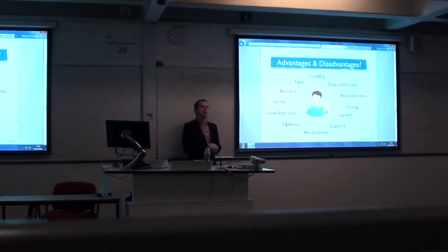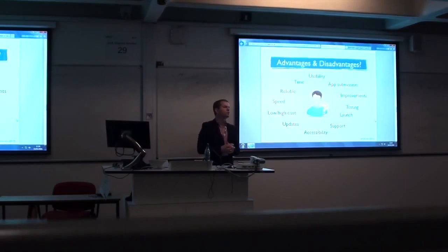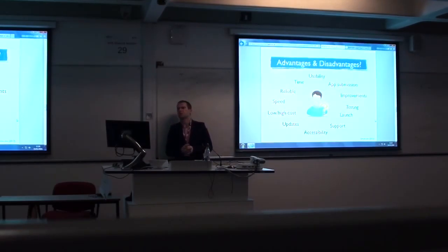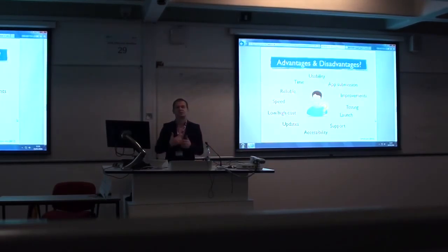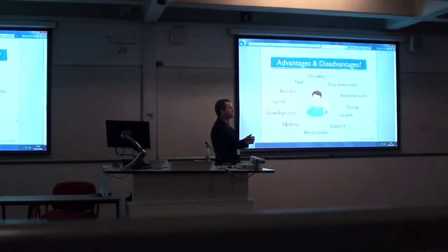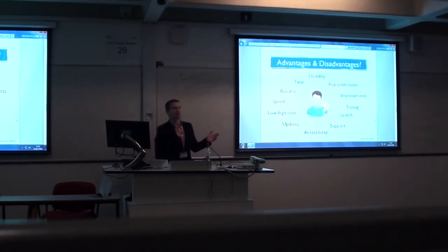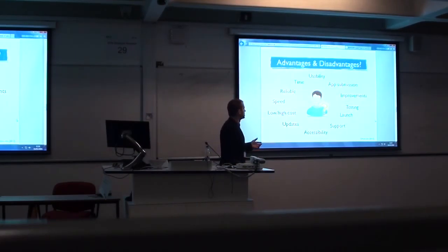In general, whenever you're hiring someone, depending on the model of payment, you pay them, I think, 40% to start the project, 40% somewhere in the middle, and 20% in the end when the project is done. So the breakdown, of course, varies depending on the service you're using. Now, they don't really do lots of testing, so testing is something you need to do yourself. When it comes to launch, they are there, but they're not really there, so you're not going to get as much support as you want.